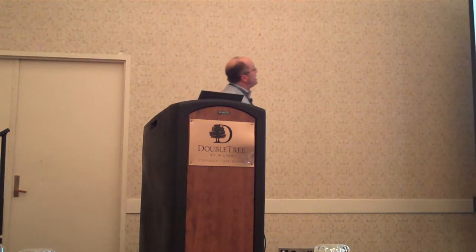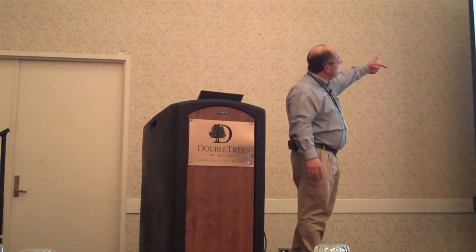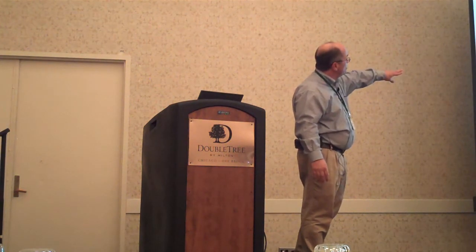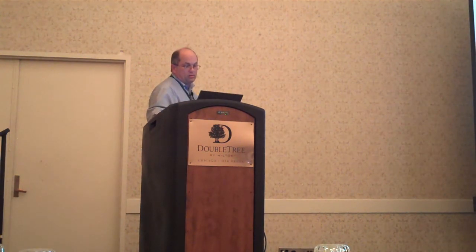Okay, so there's a sprint structure. We have a milestone at the beginning and at the end. We have some ceremonies scheduled. And we have some blank user stories that I'm going to copy and paste in here. Okay, so now we have the plan. It's in sprint 3, and we're ready to go.